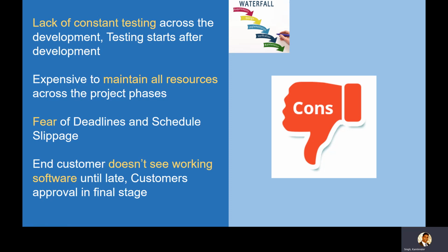The project is getting tested only when it's basically coming to the testing phase. So we may have done 1 year of requirement phase, let's say 6 months of design phase, and then 2 years of development. Testing is only done at a developer level. And there is a reason that there are quality analysts who think differently. They are involved in the testing phase. So up to later in the game, testing is not getting done.